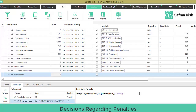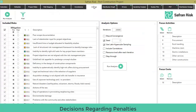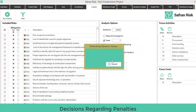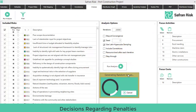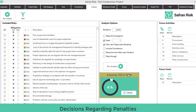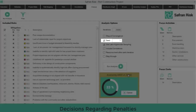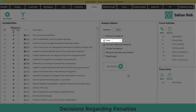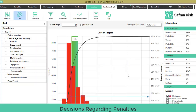With this delay functionality in place, we now proceed to simulate on the Analyze tab. We will run 20,000 iterations without stepping through the process to make for a faster simulation. Also, make sure you use the same seed value in order to guarantee identical results when re-running additional simulations. It doesn't matter which integer value you use as long as you keep it constant.